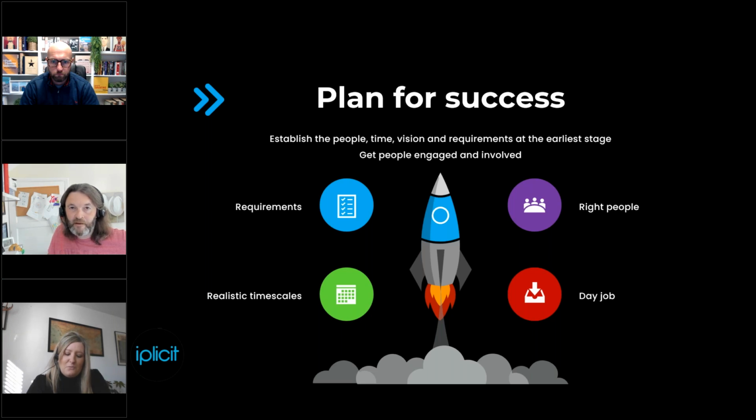If the homework is not completed, quite quickly the timelines can go off kilter a little bit, and the next session's impacted. And so again, it's quite vital that we try and help you guys maintain the appropriate time needed for the project, even if and when you're not in front of us. So of course you've got tasks throughout the implementation, so that's your homework, but absolutely you need to be planning for significant time for your own user acceptance testing. I cannot stress this enough.